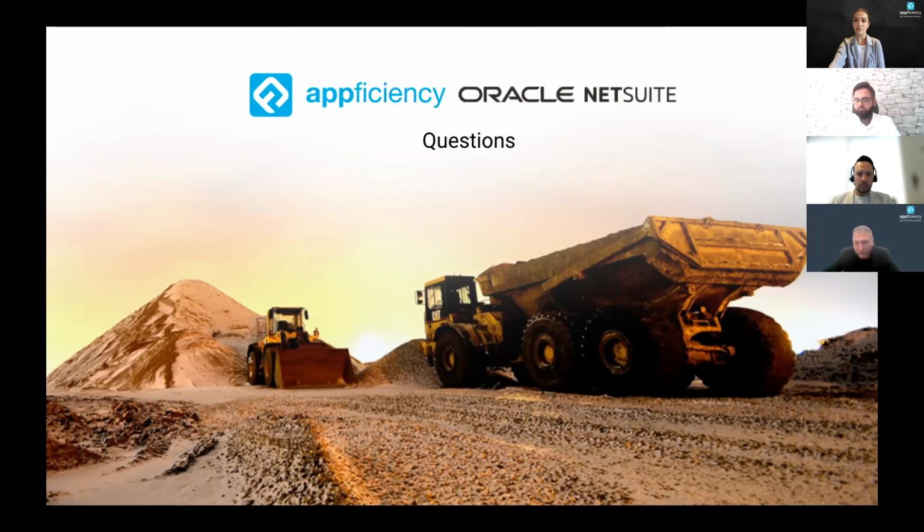And to be more specific, I'm not talking about the work completed percentage. I'm talking about the calculation of how much you should bill the client according to the AIA format. So as Joyce showed you in the ABC slide, we would have a specific column for materials stored to date. And that is specifically designed for two reasons.